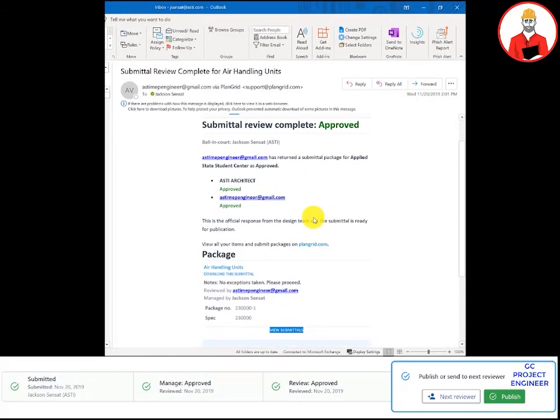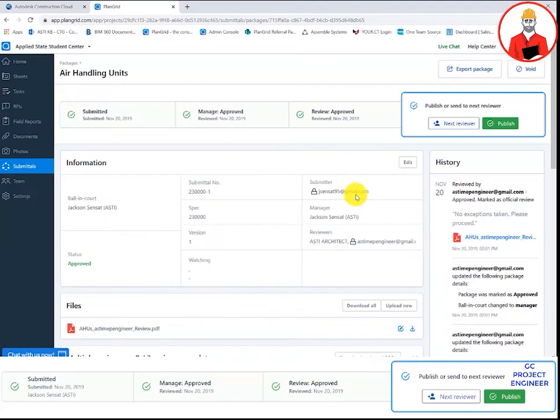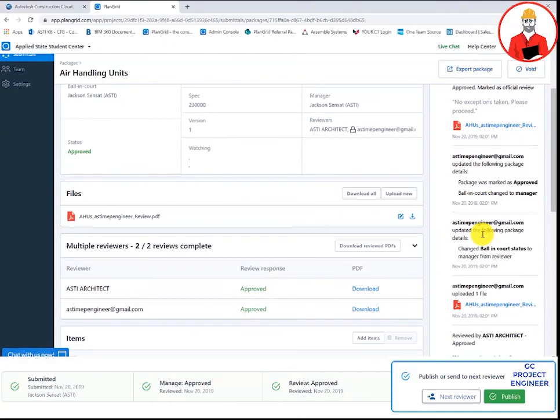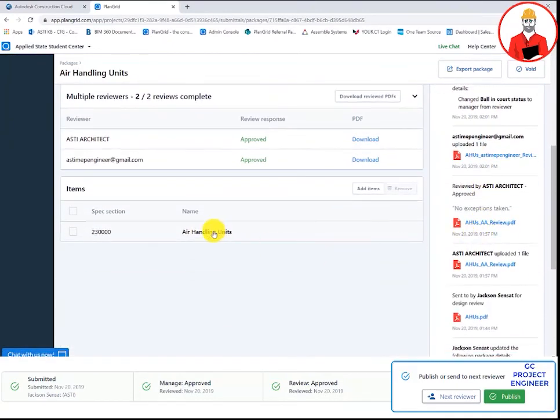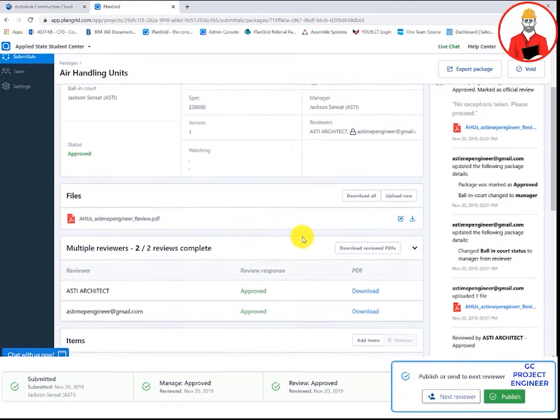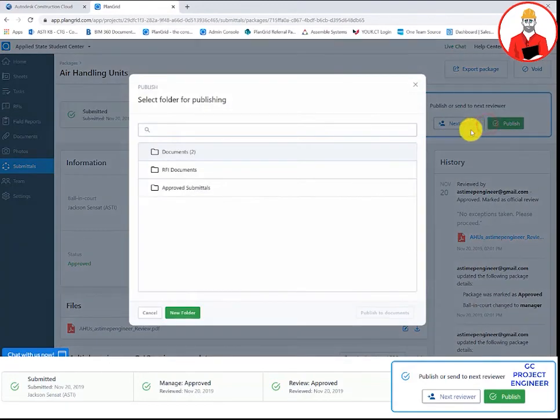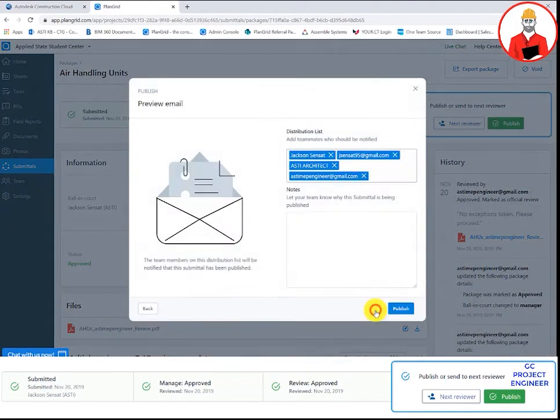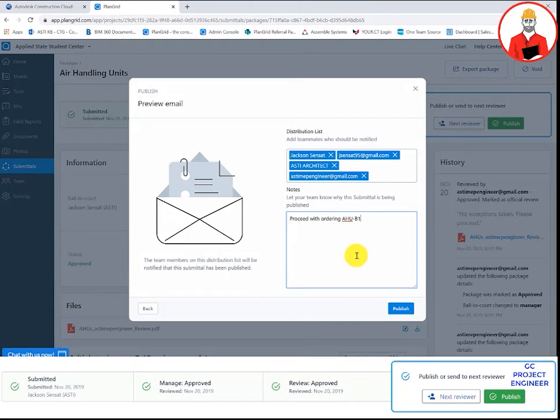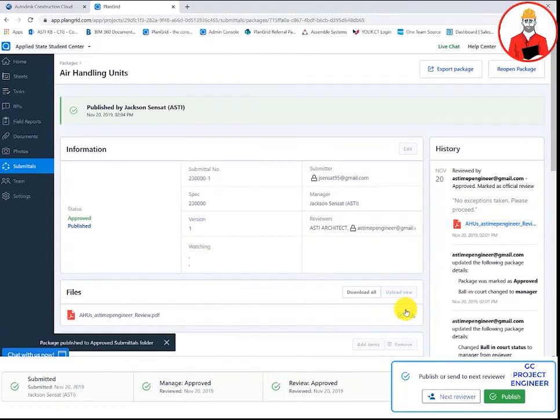Once the submittal has been reviewed by all parties, the submittal manager will receive an automatic email. Okay, this is approved as is and we are going to go ahead with these air handling units. I will close this out and distribute to all the relevant parties. Once the submittal manager publishes the submittal, they are able to select which folder and documents the submittal will land. They are able to edit their distribution list and add any relevant notes.